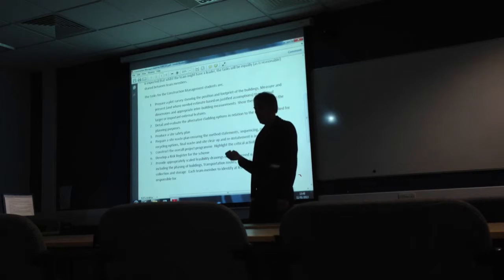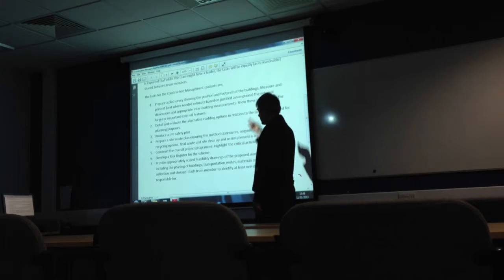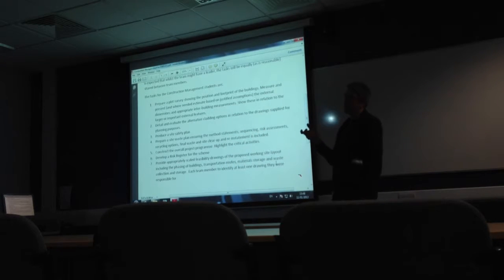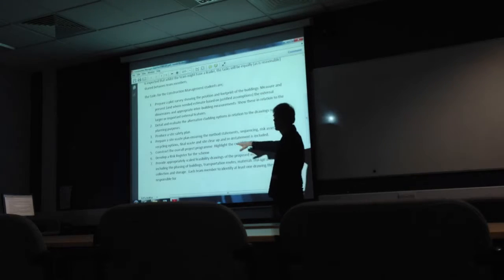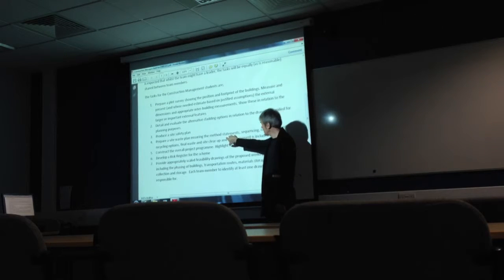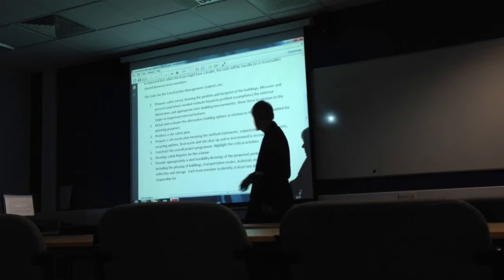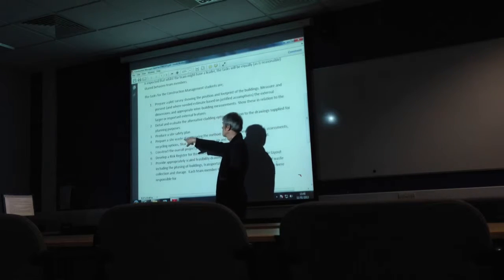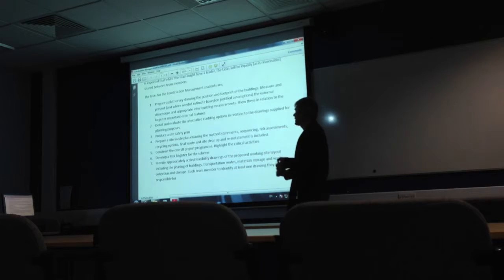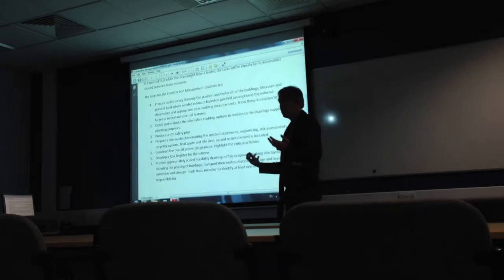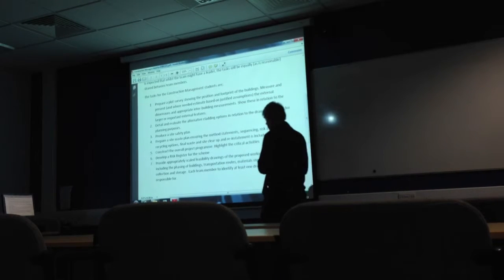Okay? So we're assuming that everybody is doing every single bit that's down on this list. Waste plan. And I've given a few more hints to you on the waste plan, where we've got things like method statements. And really, unless you know the sequencing, you don't know those. And you can't do the risk assessments until you know the method statements, because the risk is different for each way of doing things. What are the recycling options? What happens about final waste and site clear up? And also the reinstatement. What's the landscaping line and the external works?